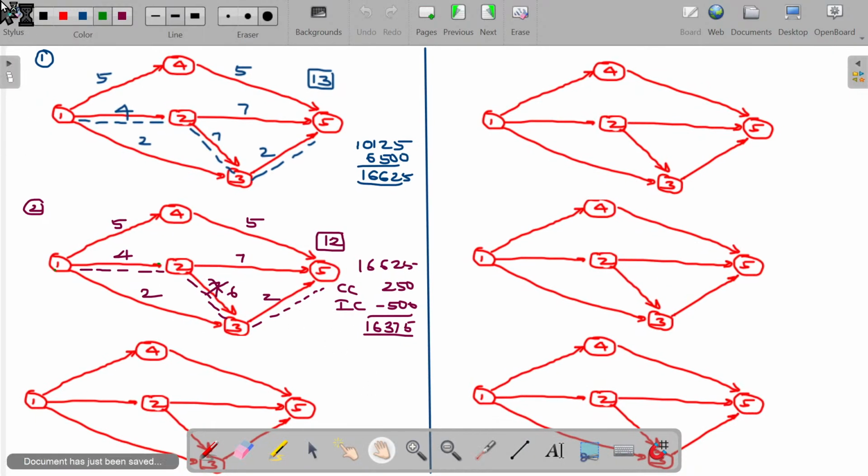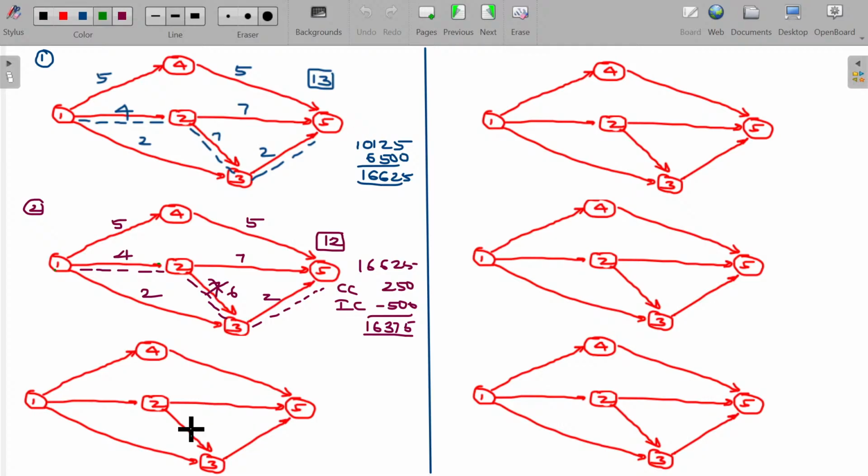Because of this reason, now originally it was 6 from the earlier one, cancel and made as 5. Rest of the other activity will carry the same duration. Okay, so I simply copy those durations here. Now, what is the critical path? 4 plus 5, 9 plus 2, 11.